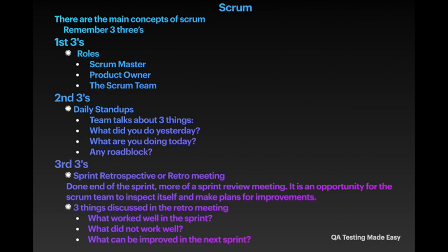Another thing to note, daily stand-ups should not be more than 15 minutes. That's for the entire team. So if there are 9-10 people, the max time is 15 minutes. So one should not give so much detail that they are taking the longest time. It should be brief, just giving status. Okay, I have worked on this ticket. For example, as a QA, okay, I have worked on these user stories, and move on.